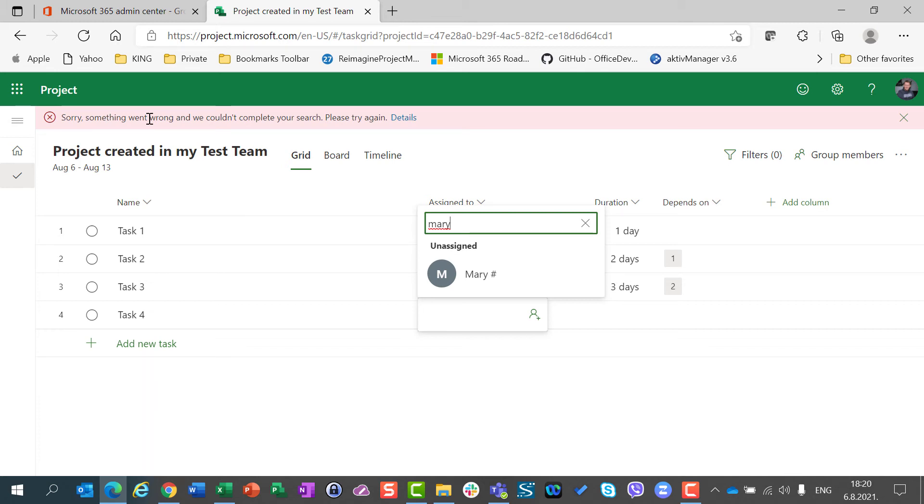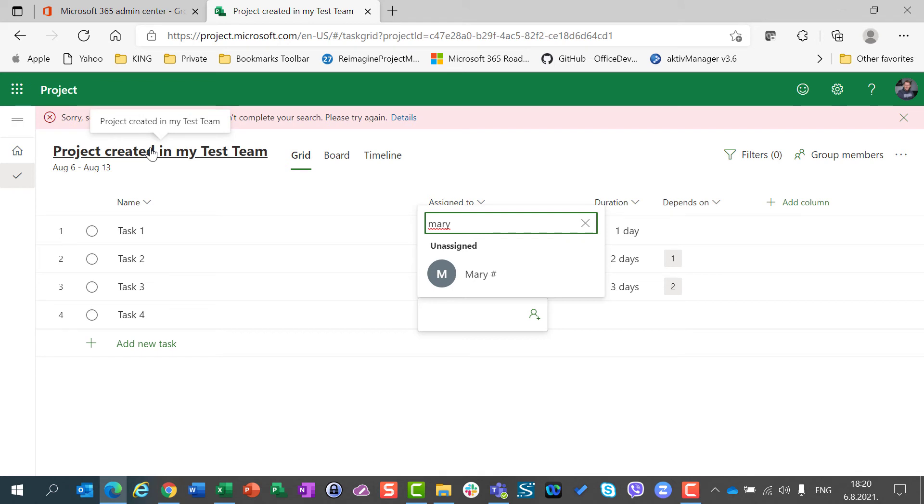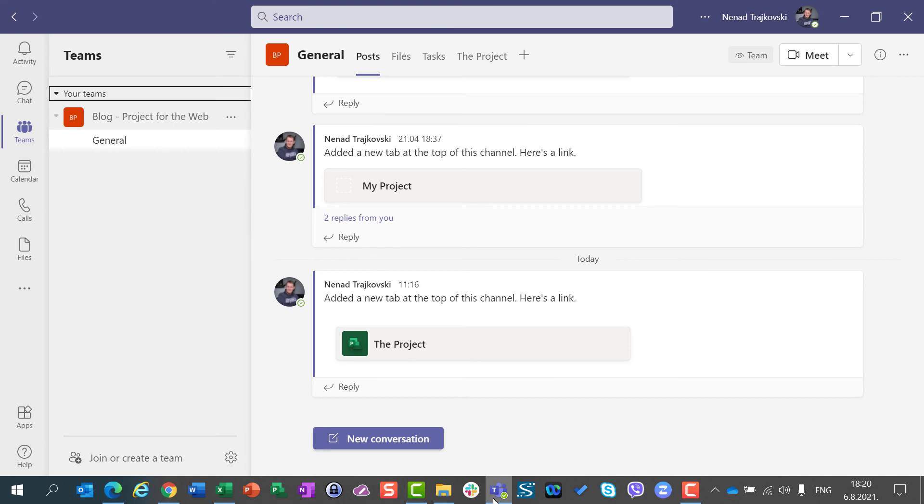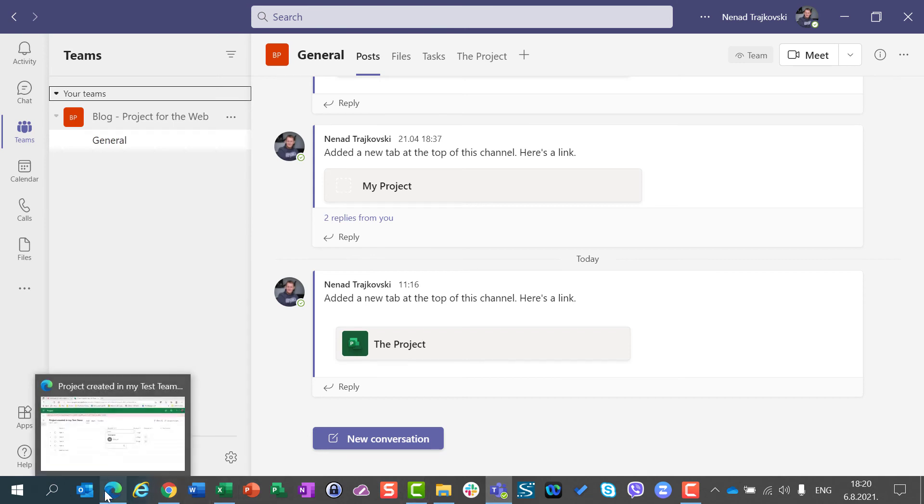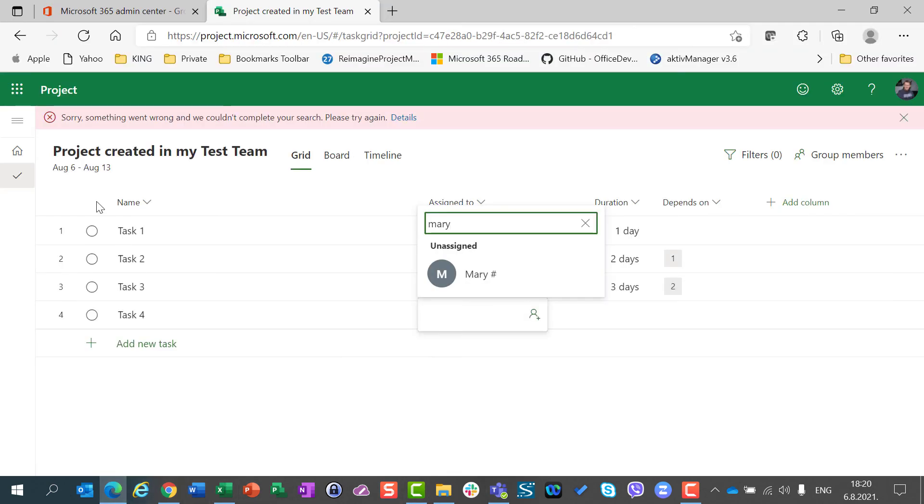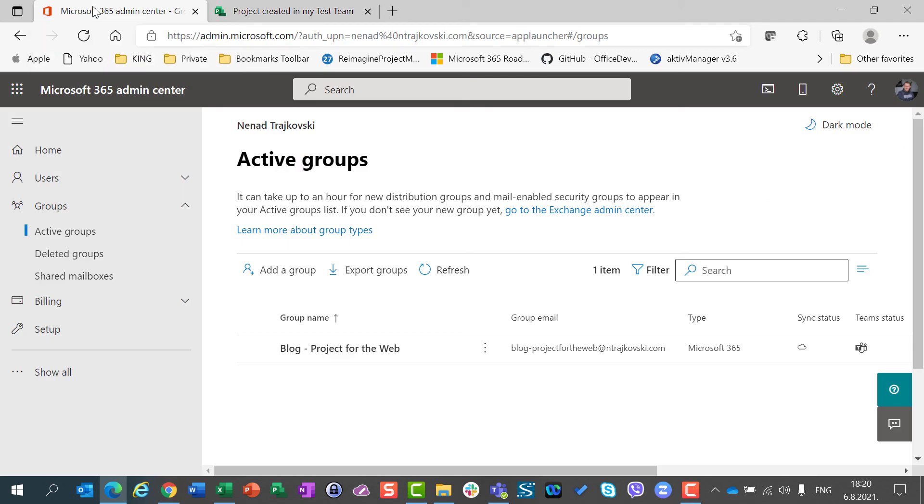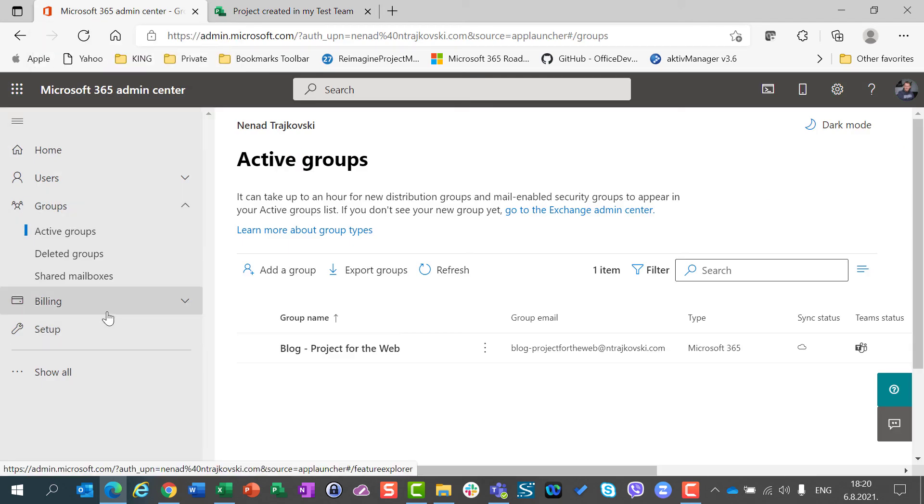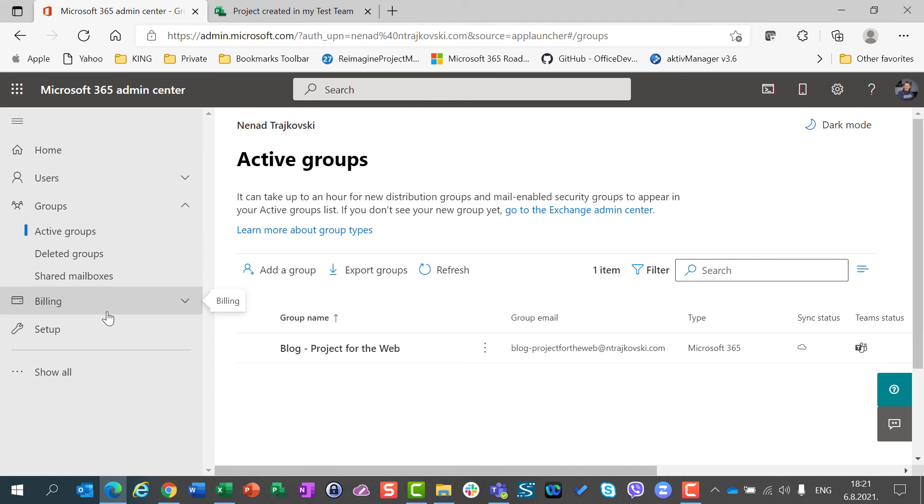So be aware that when you accidentally or on purpose delete the group which is connected with the project, then you will be in trouble. That group can be deleted from Microsoft Teams, as I showed you, or it can be deleted from Microsoft 365 admin center. So whenever you delete the group from existing project, no matter from where you delete that group, you will have a problem.